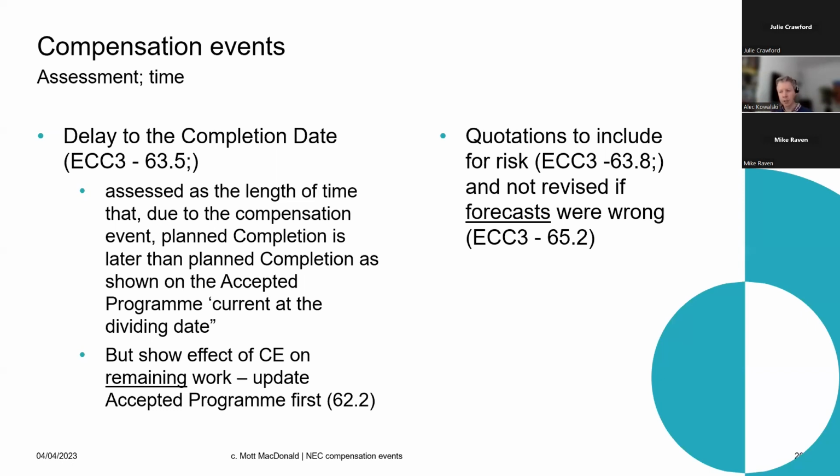You have to put it out of your head. And we forecast the effects on program and on the prices from the dividing date. Okay, and we don't go back. We do not go back.